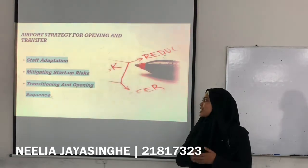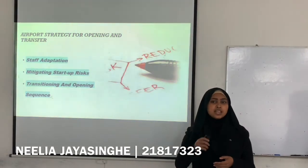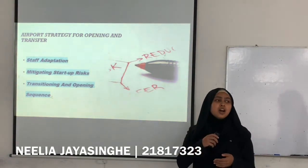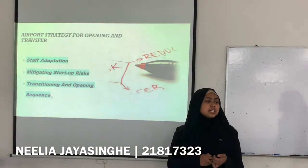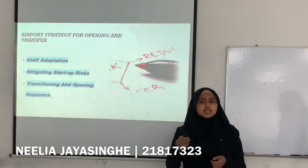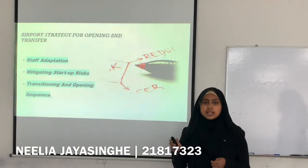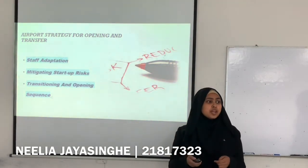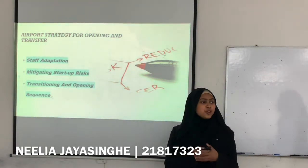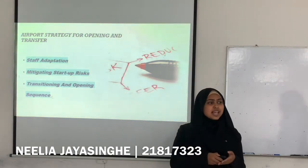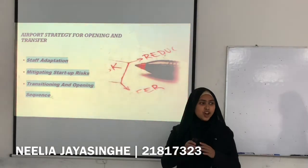Next comes transitioning and opening. On the opening day of the terminal, a list of sequences should be in order so that the operation of the airport runs smoothly. For example, 45 days before the opening date there should be a countdown. The staff at the airport should be given specific responsibilities and requirements to be completed on that day and for the two weeks after the opening date to ensure smooth operation. On the opening day, the sequencing of arrivals and departures will be segregated — meaning the terminal will be open, but fractionally, not entirely.